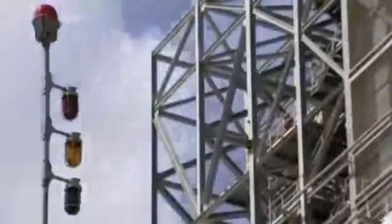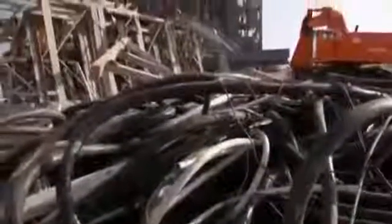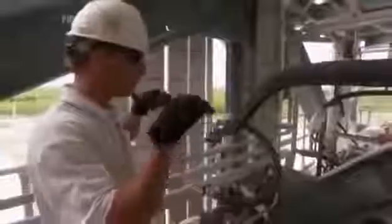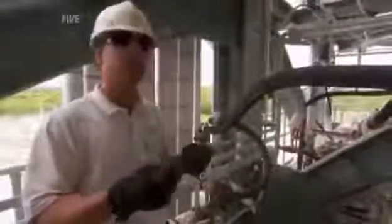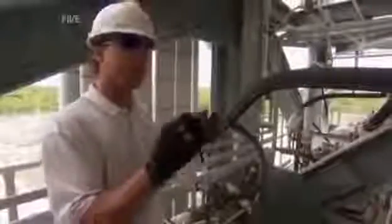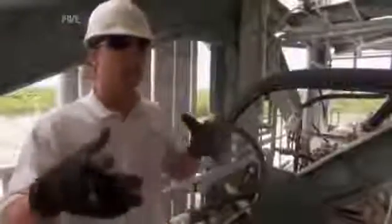The demolition team will have to remove almost 2,000 tons of steel from MST-40, a third of its entire weight. All of these things that you see that are standing vertically and horizontally, we don't like stickers in this business. They'll stop inertia, and it's just the finest thing that'll hold something up from moving. And as you can see, right now, it's the sum of a lot of parts. They now have only 28 days to gut the tower before it's demolished.